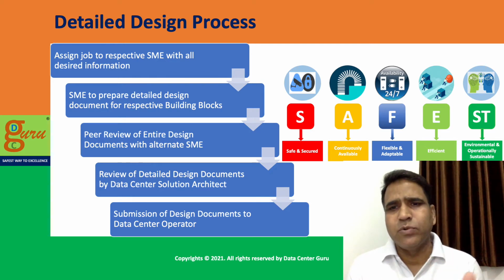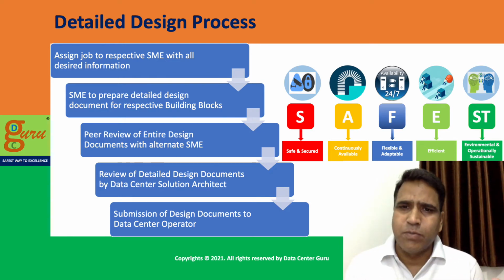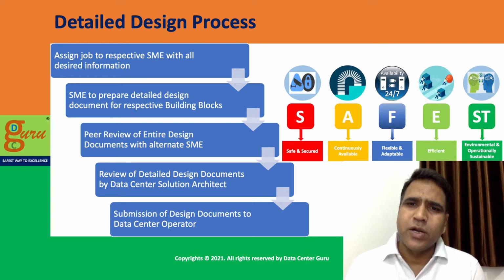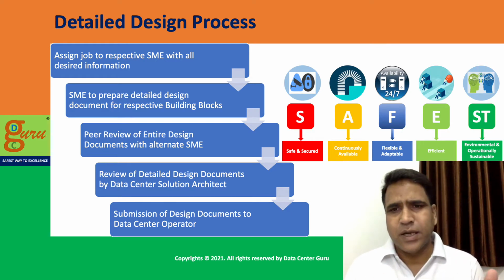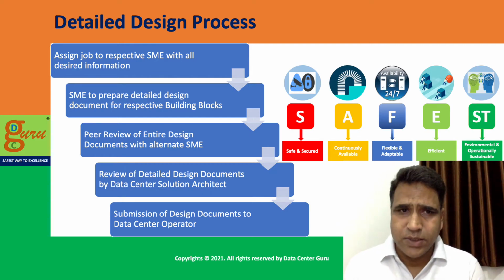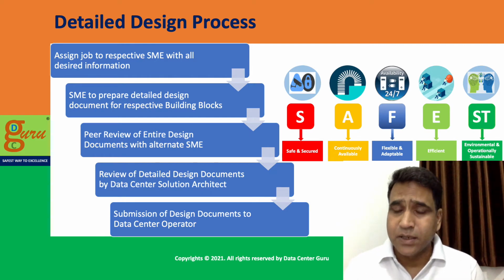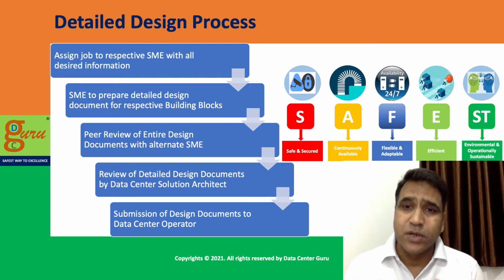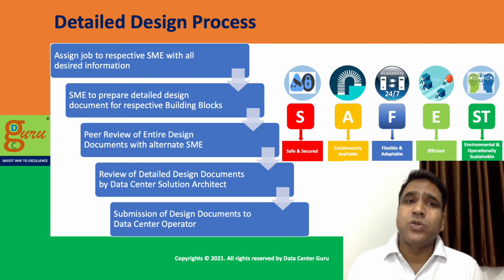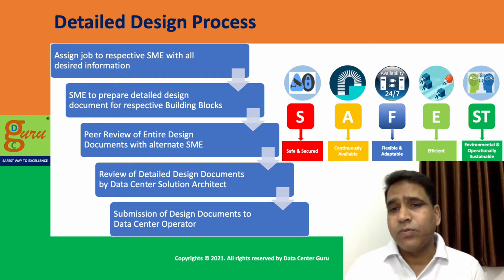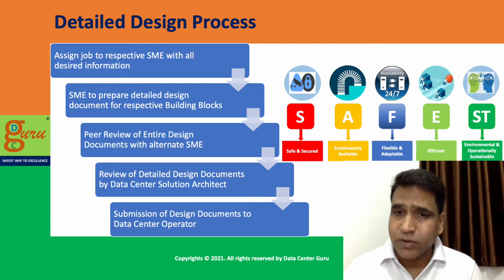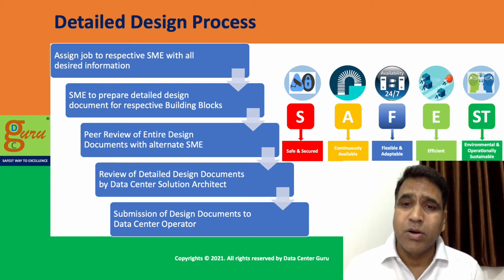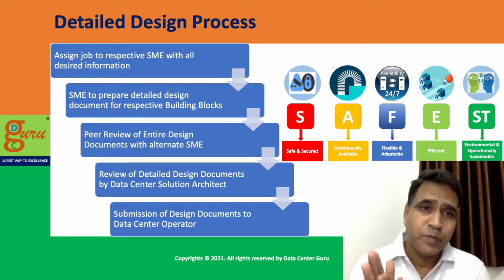Similarly, they might have to prepare a detailed layout plan which is more accurate, measurable and mapped to the site. They have to prepare a detailed bill of material. They might have to prepare a detailed technical specification and list of makes. These are all part of what the specific SME has to do for that data center building block.